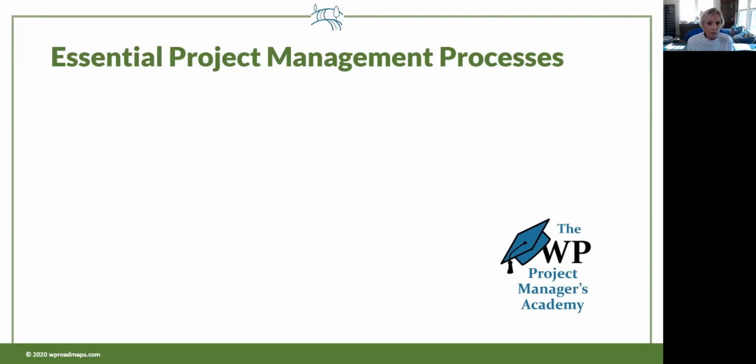And the reason we call it acceptance instead of approval is because we don't care if you approve of it, because you have to accept it because it's meeting this criteria that you agreed to 3 months ago. Okay, those are those 10 essential processes.